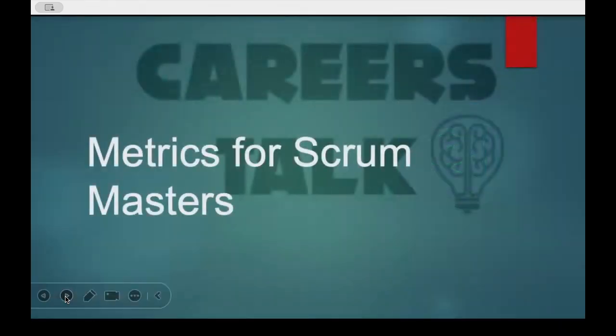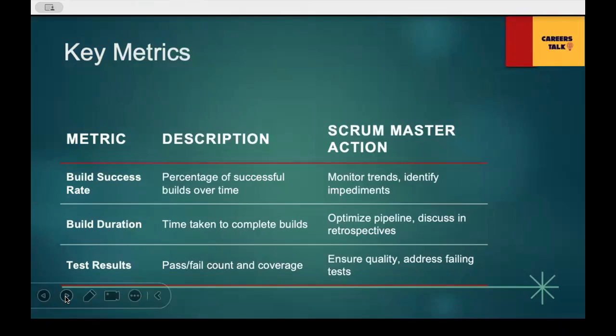As a Scrum Master, there are key metrics — cornerstones of the industry-standard DORA metrics — that you can observe from GitHub Actions. Build success rate: how stable is the code? Deployment frequency: how often are we releasing? MTTR — mean time to recover pipeline issues. Test coverage: are we covering most of the code? These metrics help you identify bottlenecks, quantify technical debt, and drive continuous improvement during retrospectives.